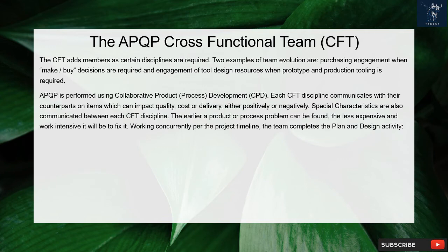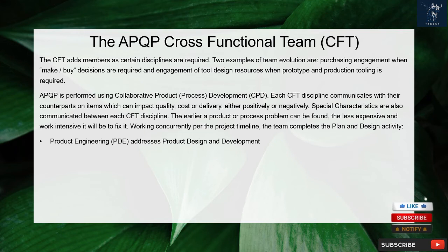The CFT adds members as certain disciplines are required. Two examples of team evolution are purchasing engagement when make-buy decisions are required and engagement of tool design resources when prototype and production tooling is required.